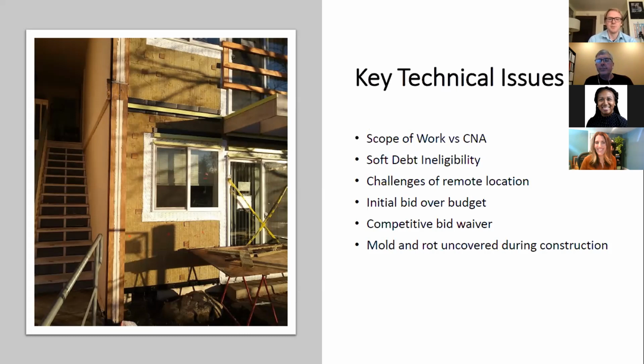The scope of work has been through multiple iterations on this project. Once again, the advantages of delays, being able to add in additional funds, expanded what we initially thought the scope of work of this project was going to be to get a lot of interior work done, because this was required on the capital needs assessment. It became clear, with that deadline, that this would need to be a two-step process.